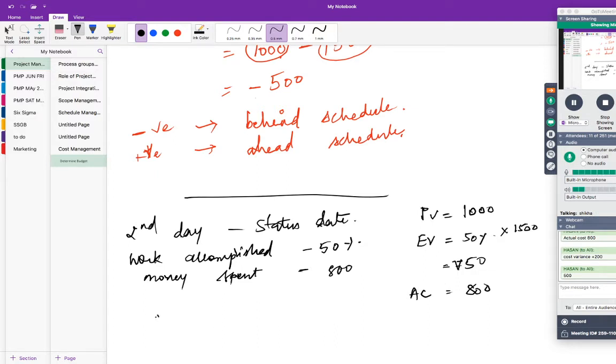So what is schedule variance? Schedule variance is equal to EV minus PV, which is equal to 750 minus 1000. Obviously you know that you have a schedule variance, correct? Because on the second day you should have completed 66%, but you have completed only 50%.